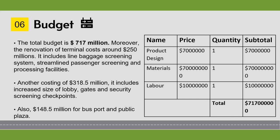Payment must take place in three stages. One third of the total is due upon signing the contract, the second payment is due midway through the project, and the final payment is due upon completion of the project.